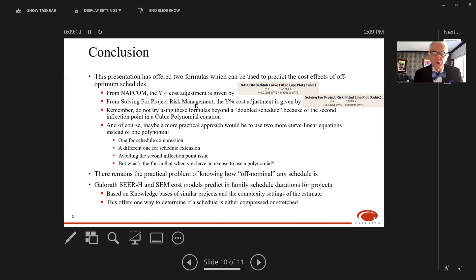Of course, a more practical approach would have been to use two curve linear equations instead of one polynomial—one for the left side of the bathtub curves addressing schedule compression, and another for the right side modeling schedule expansion. That would have avoided the second inflection point issue, maybe even given a better R squared. But hey, what's the fun in that when you have an excuse to use polynomials?